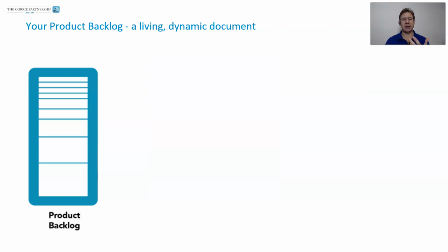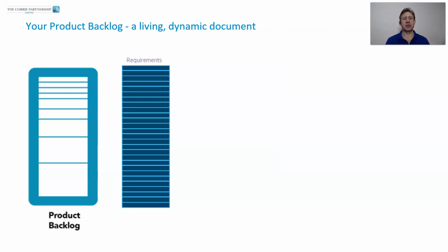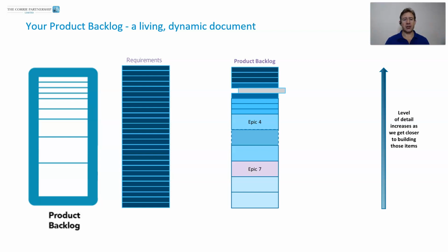And I think that we suffer a little bit because traditional project management has always started with the idea that we don't start a project, we don't start doing anything until we've got all the requirements listed in great detail and we've actually got our entire set of requirements totally nailed down. With Agile, with a product backlog mindset, we don't do that at all. As you can see here, only those items at the top are the ones that we are focusing on and refining in great detail. The rest we leave as flexible as possible.